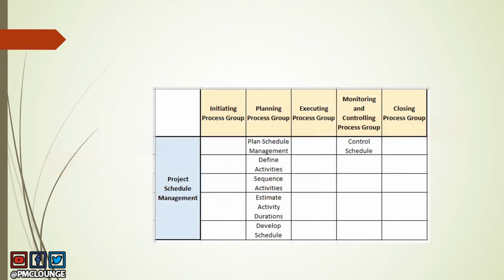All right. This is where we need to look into the basics. This is where we need to look into the PMBOK mapping. This is where we need to look into the processes of the schedule management knowledge area. So whatever we do related to network diagrams is all about developing a schedule. This is the process we are in when we are looking at network diagrams, when we are calculating float, when we are calculating early start, early finish, when we are calculating the critical path, because we are developing the project schedule. So this is where the questions that we are seeing already have durations in them.